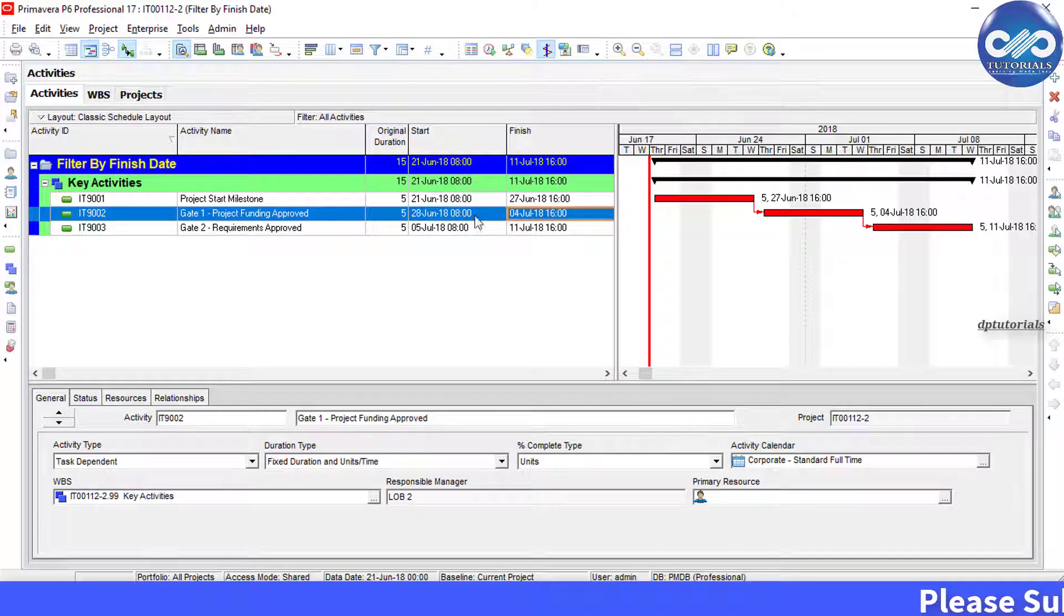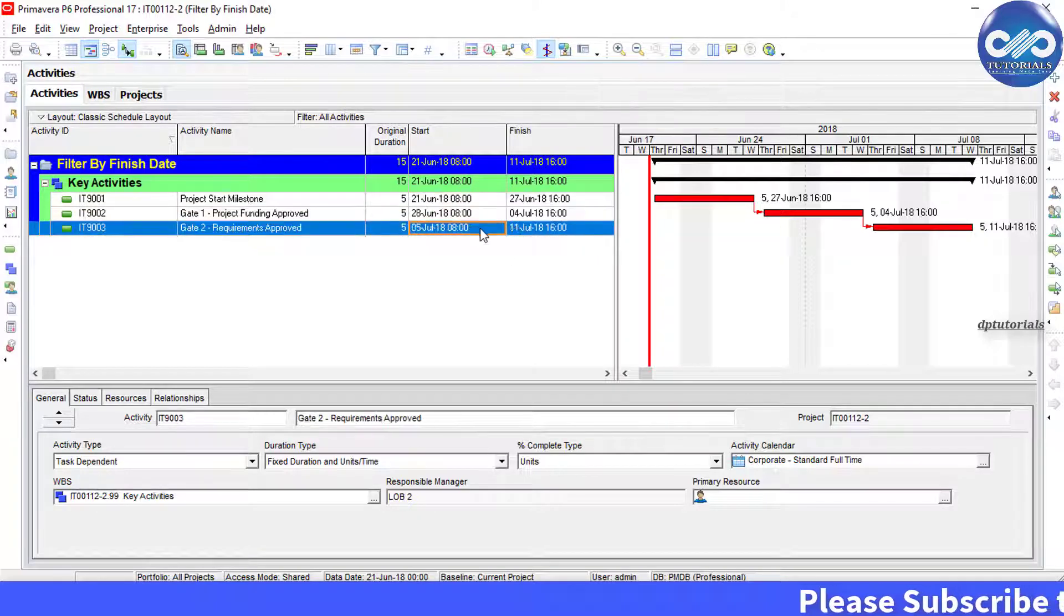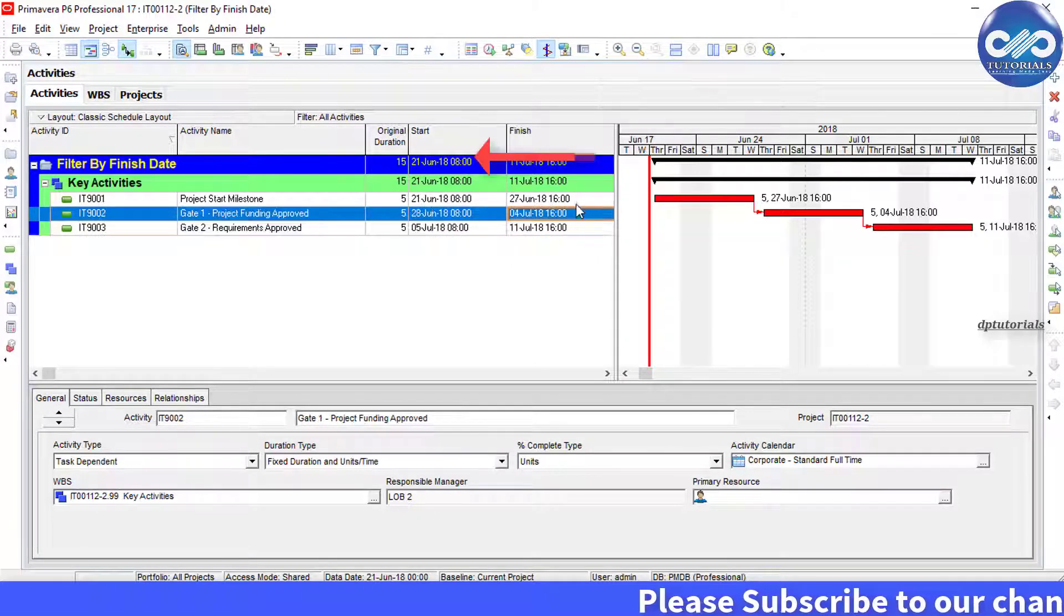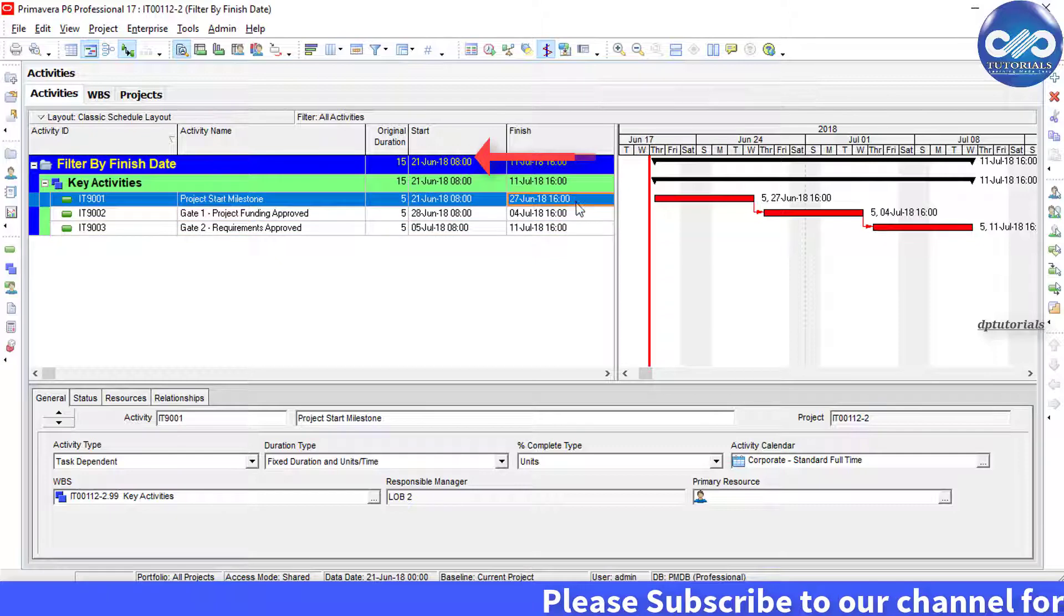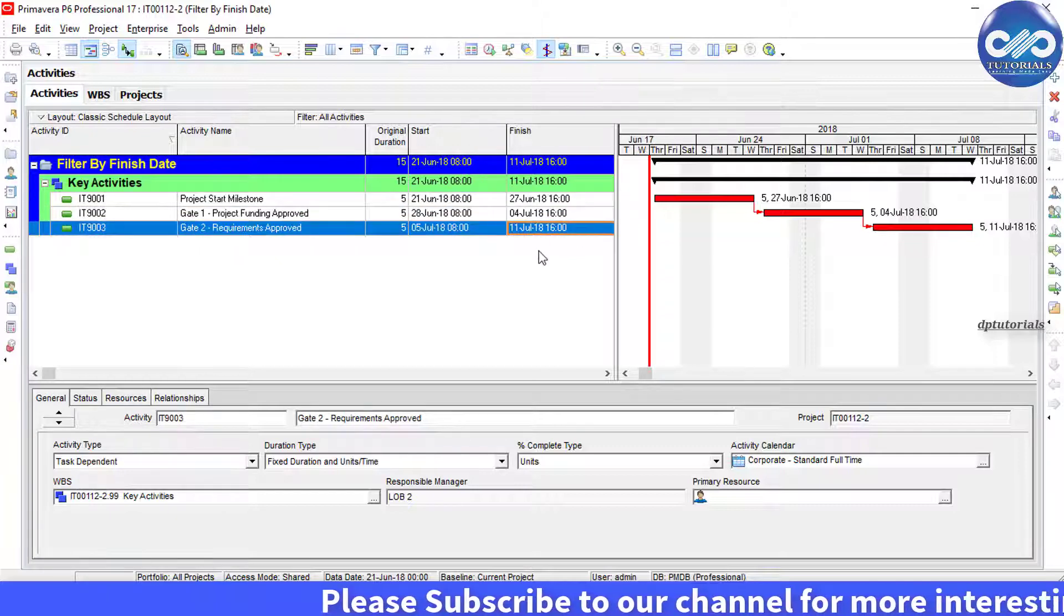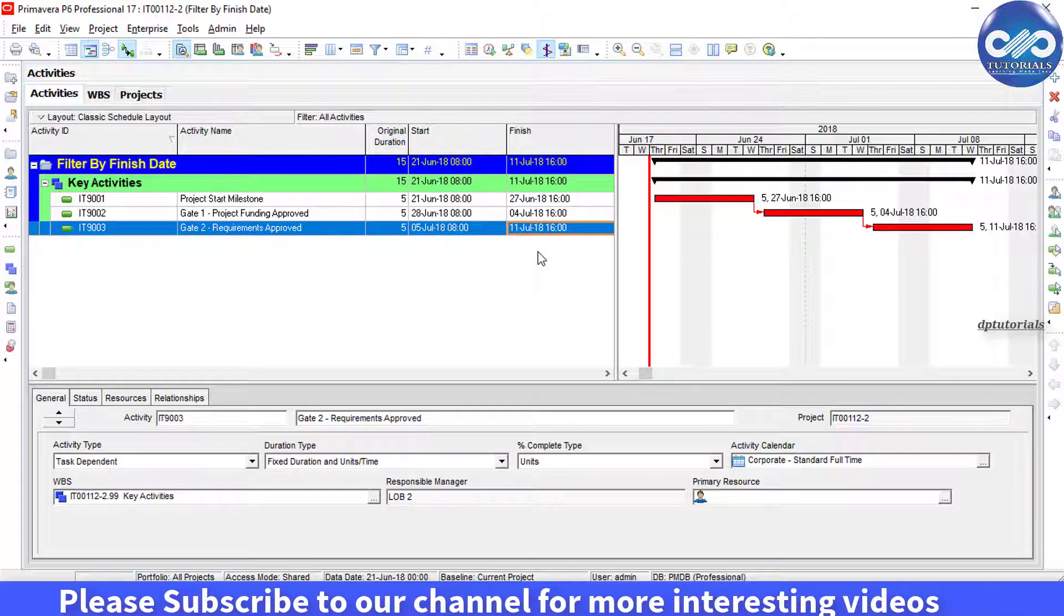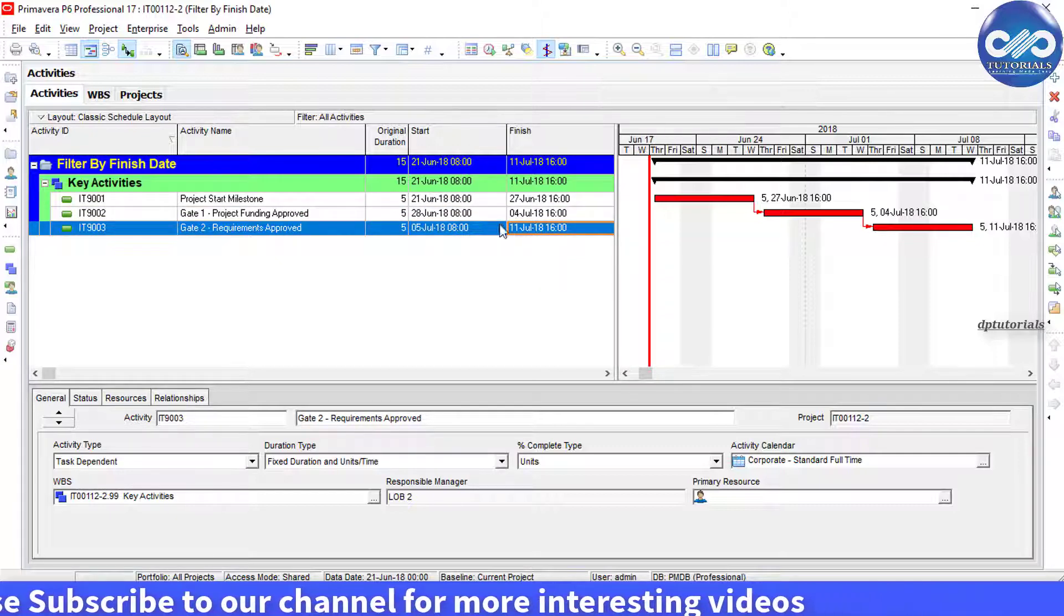You should have noticed by now that when we created a filter, Primavera will treat the time as 00:00 by default. That's why P6 cannot find any activity.